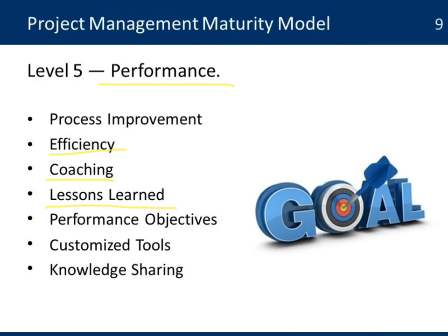A lot of the lessons learned are then applied into new projects. So there is a process in place that every project produces lessons that are used in all the projects during the design and during the planning. There are also performance objectives, what is expected not only of the teams but also the projects about how they need to perform and what those objectives are. There are also customized tools, more complex tools, and even knowledge sharing systems or platforms that help different projects communicate with each other and start creating some synergies in terms of how they bring those lessons more into the day-to-day work of the projects and not having to wait until the end. So that knowledge sharing environment is now used across the different projects.